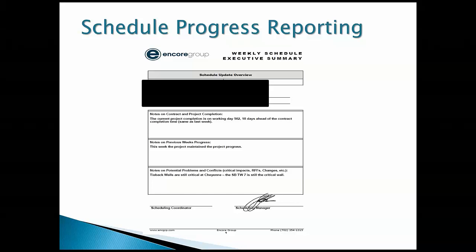What happened? So that I can see that whole project creep at work. Once that happens, it brings accountability to let the project stakeholders know, whether it's subcontractors, general contractors, or owners, hey, this week we lost 3 days because of this issue, right? And get that documented. Managing the critical path that way and bringing that accountability to the project can really help facilitate a good, structured way of encouraging people to meet those dates.